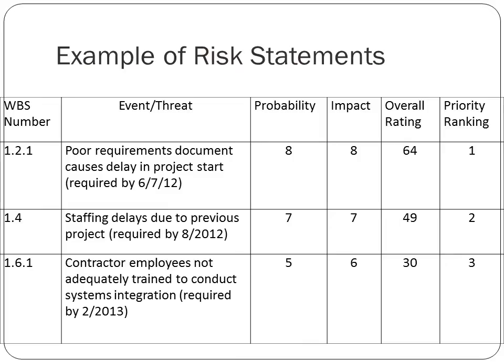Here are some examples of risk statements. We've used a simple Excel spreadsheet to record these. First, we record what task or part of the work breakdown structure we're discussing, and what the event or threat is to that particular task. The probability of it happening is assigned on a scale of one to ten. Similarly, the impact on a scale of one to ten, and we multiply those two together to get an overall rating. We do this for all the risks identified and then have a priority ranking of them subsequently.